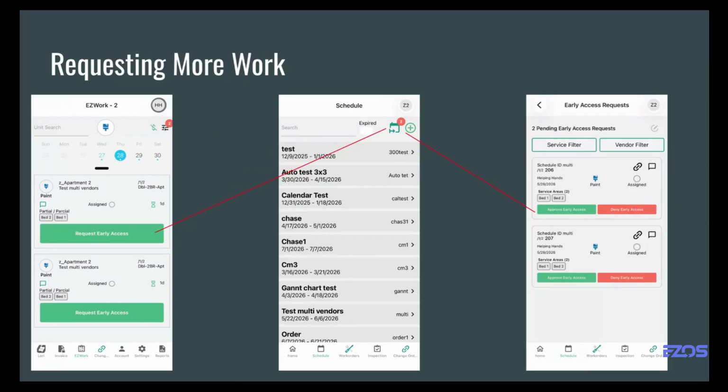Another thing we do is in student housing, we schedule per day. Why do we schedule per day? And not everyone does. Maybe you're listening and saying we don't do it that way. But I'll tell you, for the sites that we have, the large majority schedule per day. It really helps you measure if you're on schedule each day. And so we'll often do something where we have amount of work and divvy it up amongst the days that we're doing the turn. That and some communication with your vendor to be able to say, hey, how many can you do a day, right? And you're going to find out. But anyways, all that to say, we often set it per day as far as how much work is done per day.